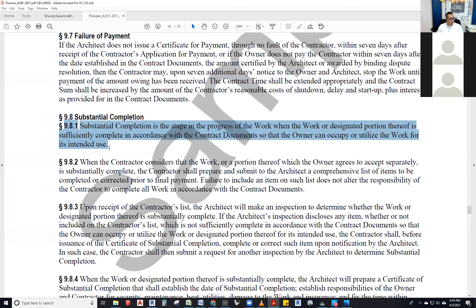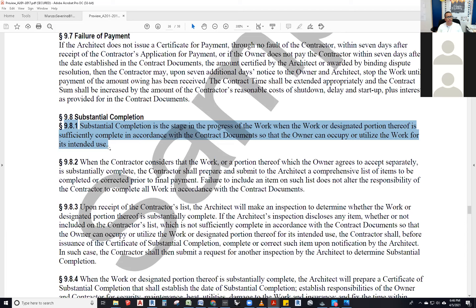Section 9.8.1: substantial completion is the stage in the progress of the work when the work — or designated portion thereof, because there could be multiple substantial completions on a phased project — is sufficiently complete in accordance with the contract documents so that the owner can occupy or utilize the work for its intended use. Doors are supposed to open and close, windows open and close, floors are level, stairs are built to the correct dimensions.